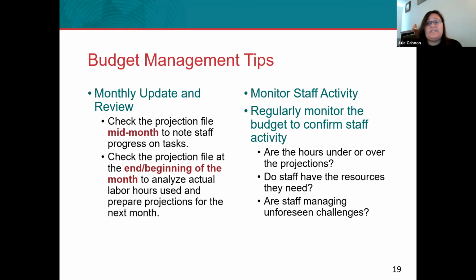So if you see that someone is spending not as much time or more time, when you have your check-in with your staff, you can ask them about it and just kind of confirm and see what's happening. Maybe at that point in that conversation, you all can talk about where some of the effort might need to shift, or if you need to have another person come support your staff. It's all about being able to balance the workload so that they're appropriate for the staff and you're not burning anyone out, you're not stressing anyone out, and that you're able to meet the task requirements.